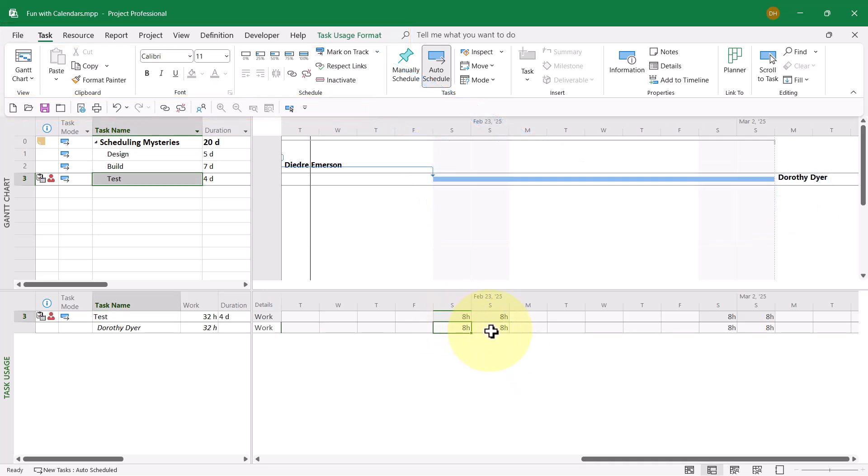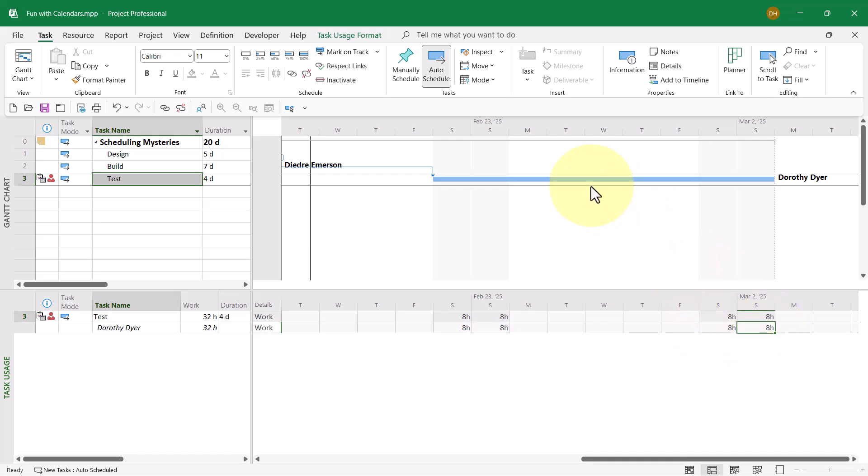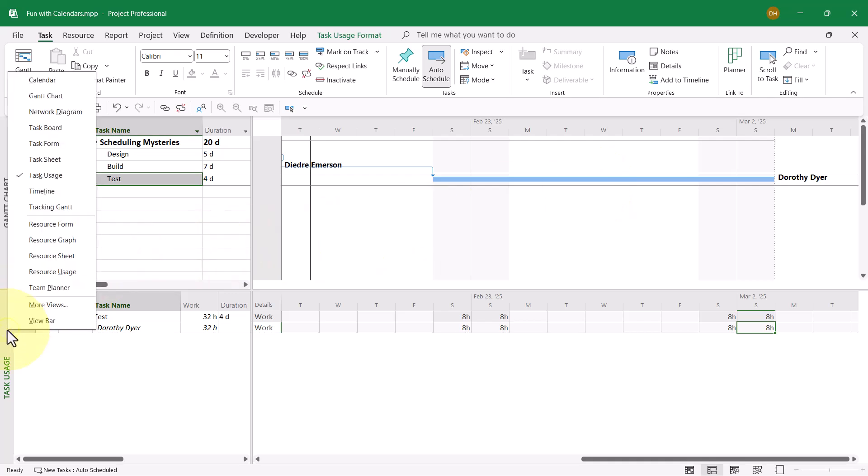Eight hours the first weekend. Nothing in between during the week. Remember, these are weekend-only tasks. Eight hours a day for two days. Nothing Monday through Friday. Eight hours a day for the next two. So the duration is one, two, three, four days, even though the time span appears to be longer than that.